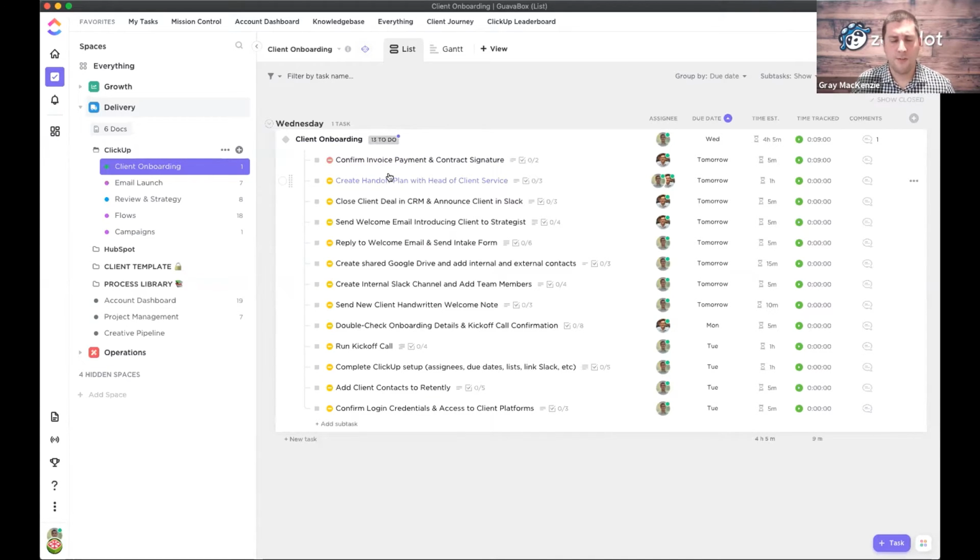And that terminology is probably a little confusing. I should stick with tasks and subtasks, but just think of this as taking a more complex item that needs to get done and breaking it down into the pieces that are owned by each person. Our rule of thumb for each task is going to be one person. If one person does it in one sitting, that's a task. There are a few acceptable exceptions to that, but that's the way that we think about that.